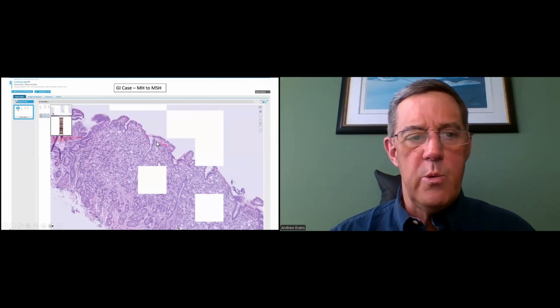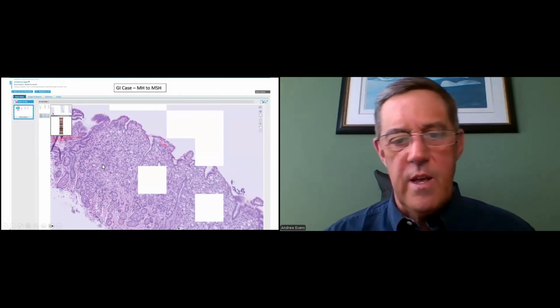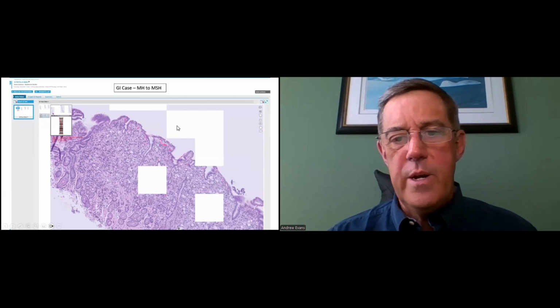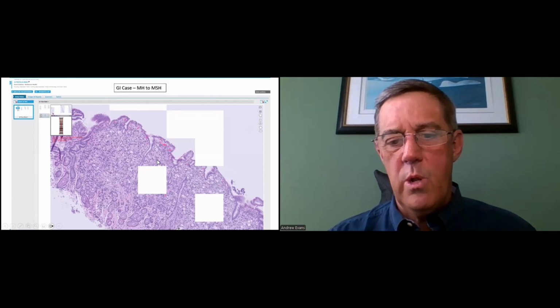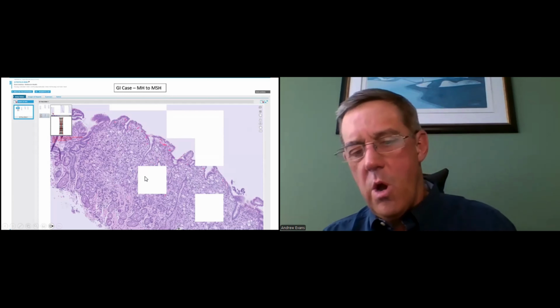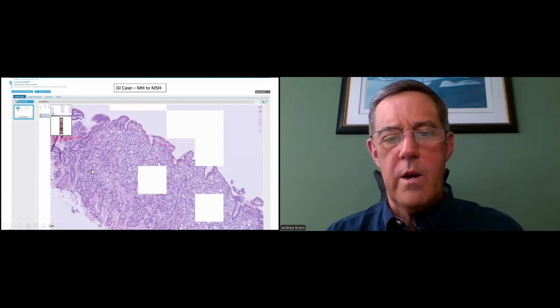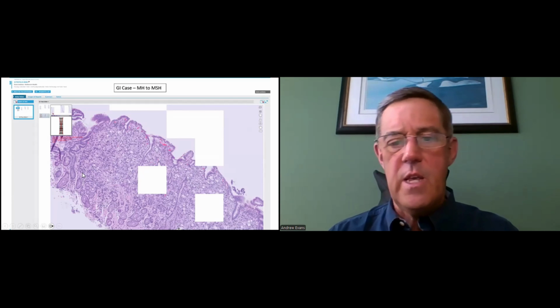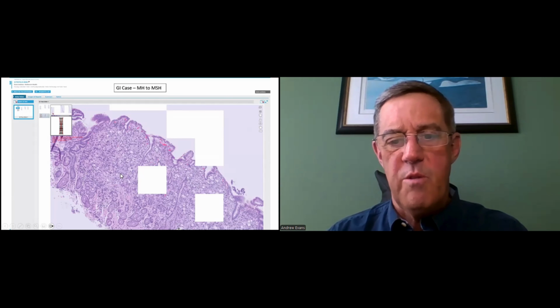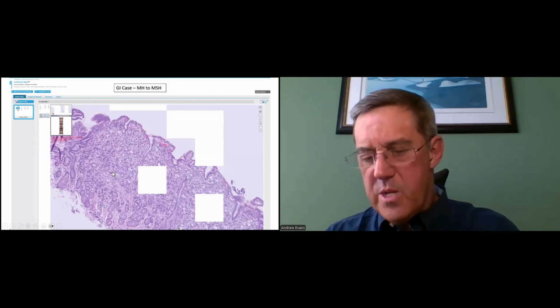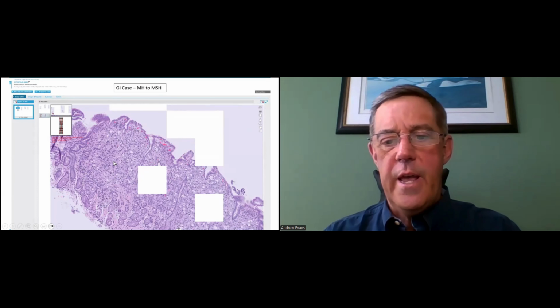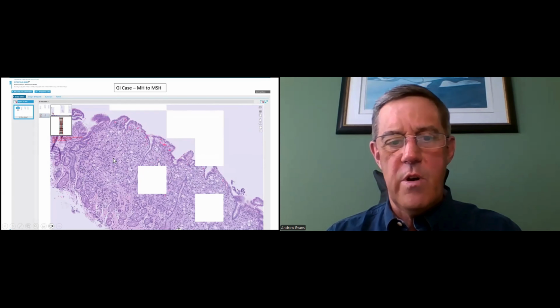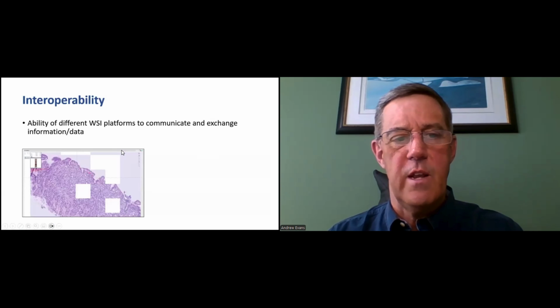When we uploaded to the third-party platform, to share with colleagues at Mount Sinai, we noticed there were these large white patches where whole areas of pixels just didn't cross an interface. And this required a major software rewrite on the part of the third-party solution provider. So again, this really speaks to the need for interoperability and checking these things very carefully as you go and looking for these problems, which really can sideline an entire project or delay it significantly.